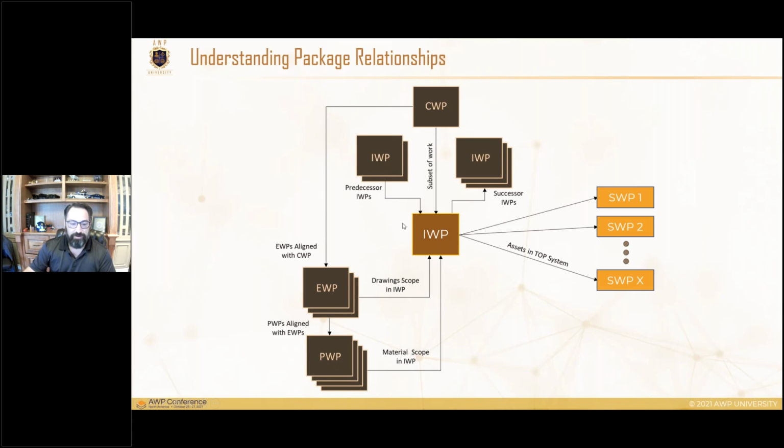And what I mean by gravity is if you need to install a spool at elevation before you can attach the next spool at the 10-foot level, obviously gravity dictates there's a predecessor IWP and a successor IWP. Obviously, we're going to build to support from the ground up type scenarios. So predecessor and successor IWPs, that's more from an execution requirement, if you will.